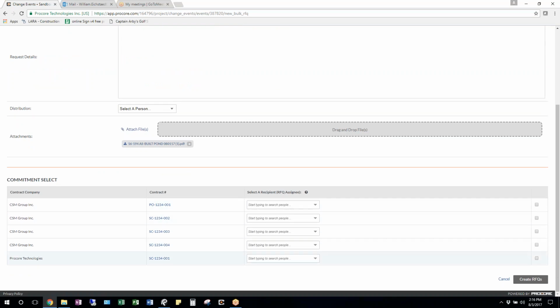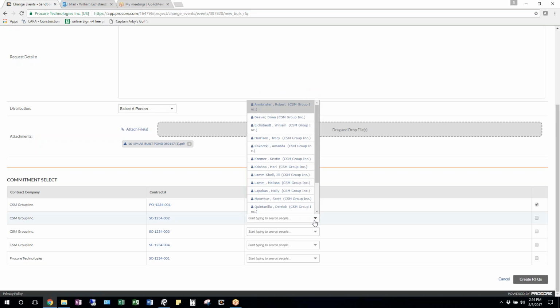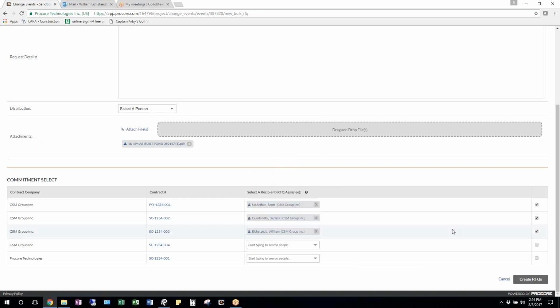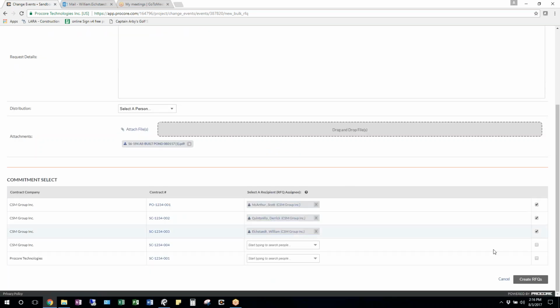The commitment, these are all just kind of test things. This would be all of your people in your project, so you could go through and select who you would put. You would send this to your electrician, Scott MacArthur, your general trades guy, Derek, your concrete guy, Bill, and so on and so forth. And you would basically write out what you're asking them to price right in this request for details here. Once you're happy with that, these people right here will already accept the email. They'll get that email in their inbox through Procore, and a window will come up leading them to provide pricing, and they just enter it in right there.